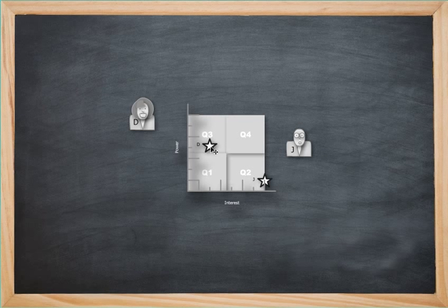Stakeholder D is in quadrant 3, which is basically high power, low interest, and all they probably need to be is informed. Detail isn't quite as important to them, but be aware that they can help. We call them cheerleaders. Stakeholder J is in quadrant 2, which is low power, high interest. The more detail, the better, and they tend to be your backers. Other stakeholders may reside in the other quadrants, such as quadrant 1 and quadrant 4.